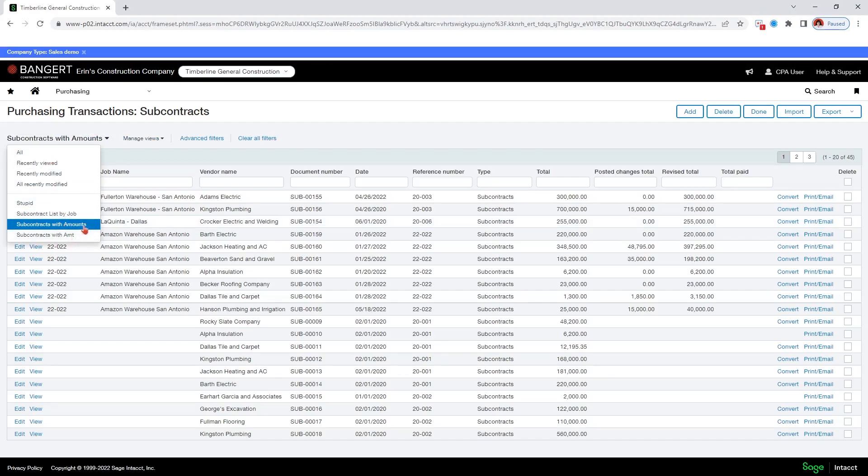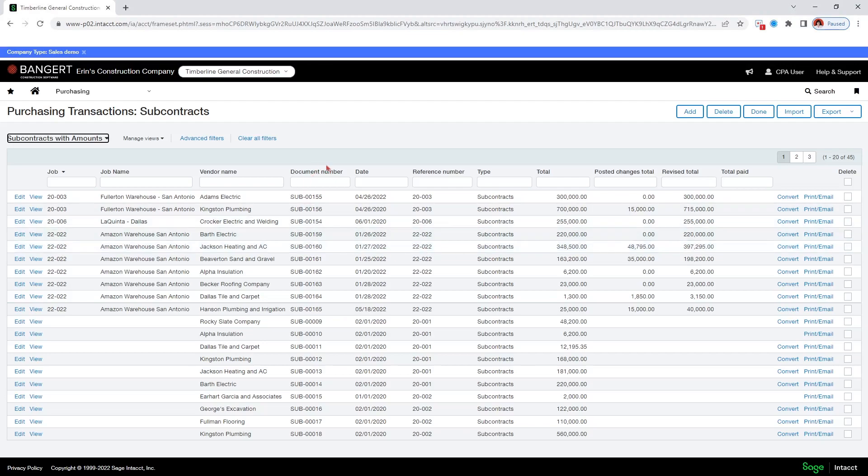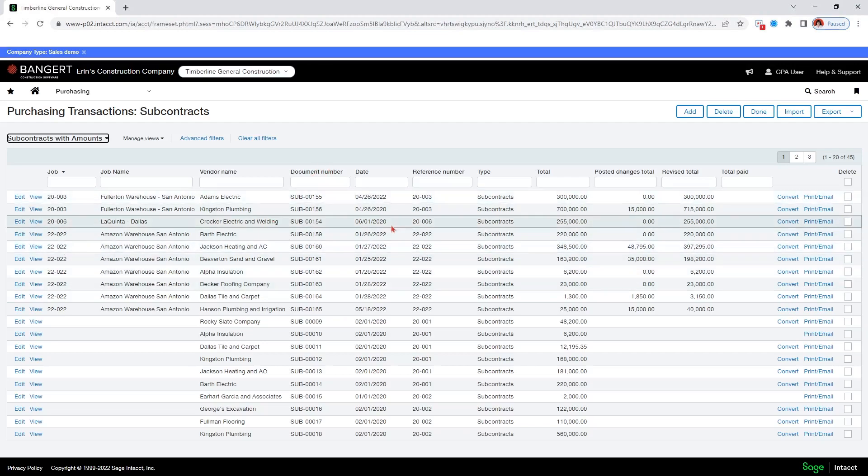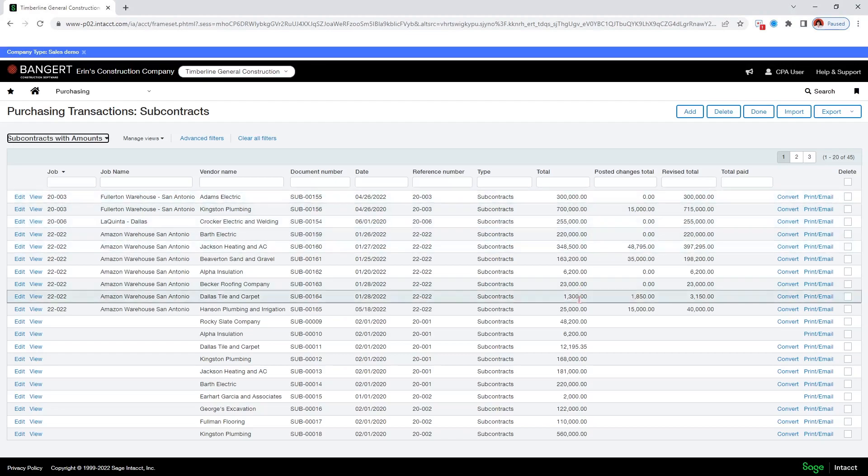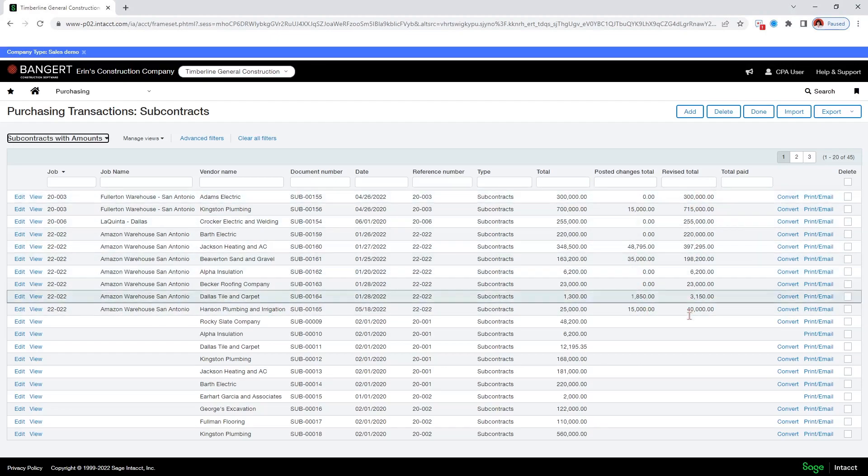So I want to just, and I can edit these custom views. So now I have this custom view and it's a lot more informative because I have my document number, I have my job and the vendor and I have my total. This is my original total. These are the changes for this subcontract or commitment. And this is my revised total.